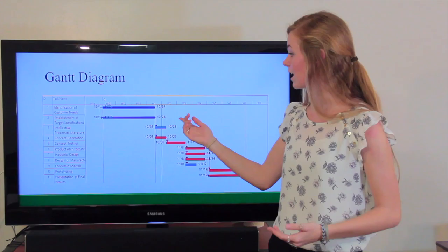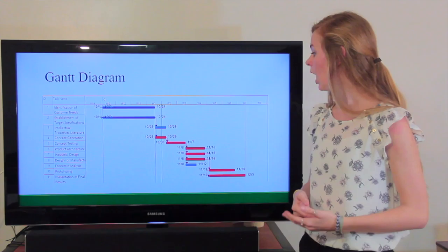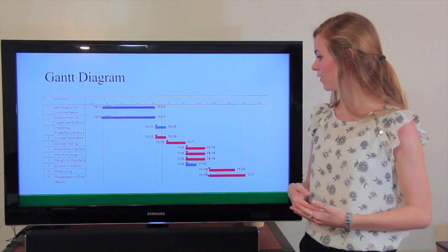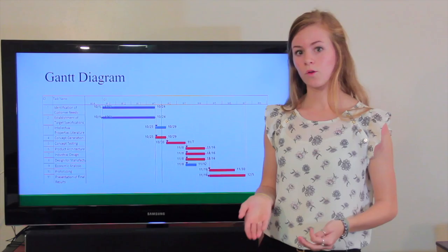Next, we worked to develop a Gantt chart, and this was to help keep our team on task and on time with the tasks that we need to accomplish. So far we have completed the identification of customer needs and the establishment of target specifications. The rest of the tasks that are highlighted in red is the critical path for the rest of our project. These are the tasks that will take the longest, and so if any of those run over schedule, it will end up delaying the completion of the entire project.